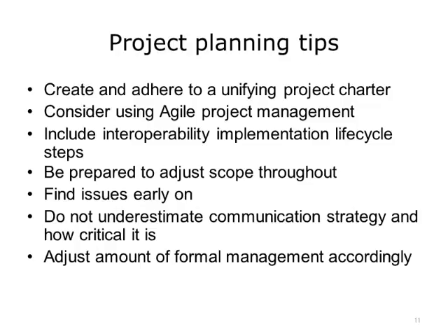The life cycle steps should be included as tasks in the project plan because each one is important. By carefully following these steps, you can identify issues before the project is too far along. The less you have actually implemented, the cheaper it is to resolve or cancel.